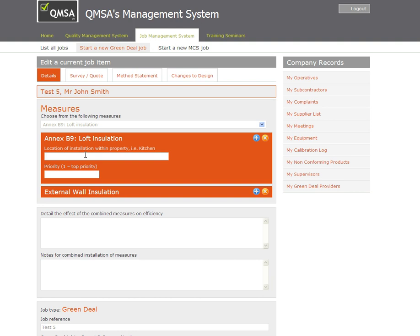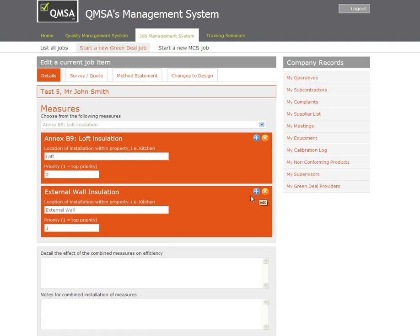It's going to ask me for details of a location and a priority. Now I've said loft is priority two. This is because if I open this one up I've got external wall as priority one. So external wall is going on first and then loft second. This is a requirement to record as part of PAS 2030.